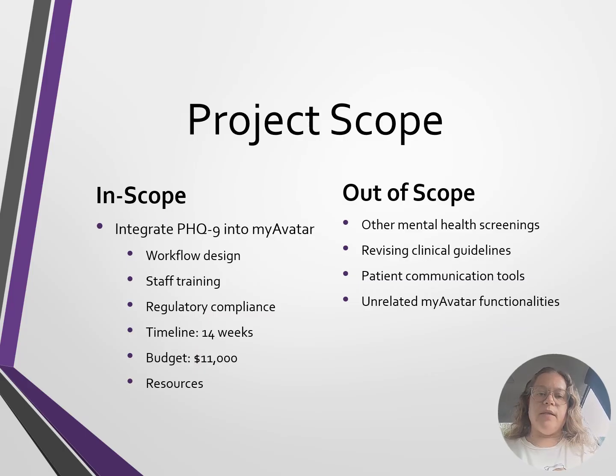As part of the planning phase of the SDLC, the scope of this project is as follows. This project will integrate the PHQ-9 form into my avatar for the project site, including staff training and workflow design to incorporate depression screening. The scoring and interpretation will be automatic. It will integrate with patient dashboards for tracking symptom trends. There will be no development of new hardware as the focus is limited to software integration and workflow optimization.